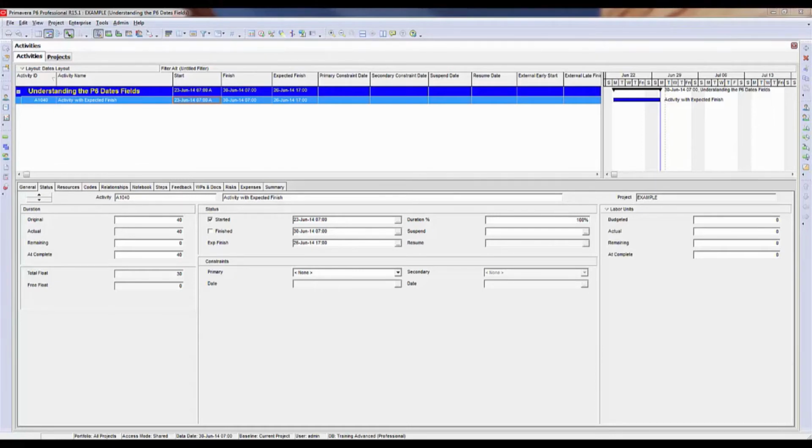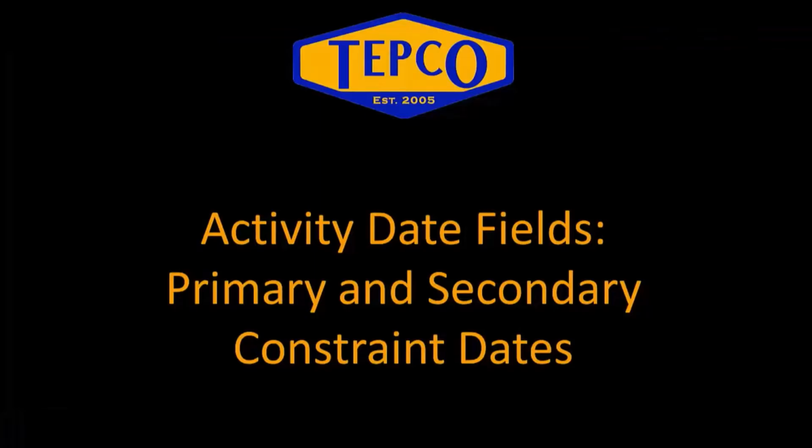find this beneficial. Just be aware that P6 does update or progress the activity on its own. The benefit is that it will not actually mark the activity as finished automatically. You still have to come in eventually and put the finish checkbox on it and set the actual finish date.